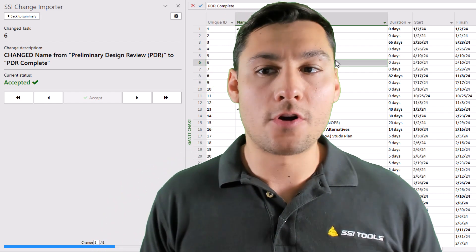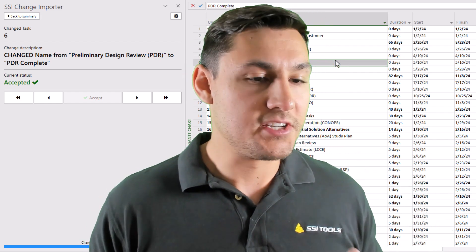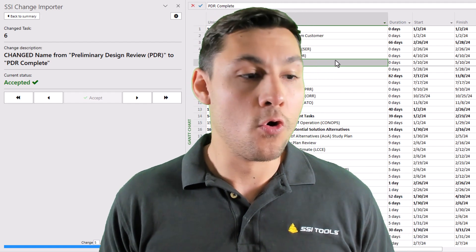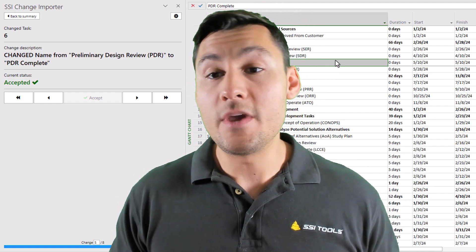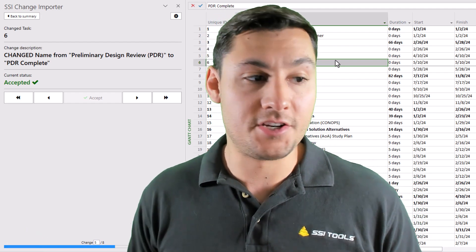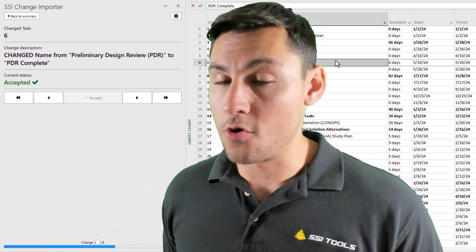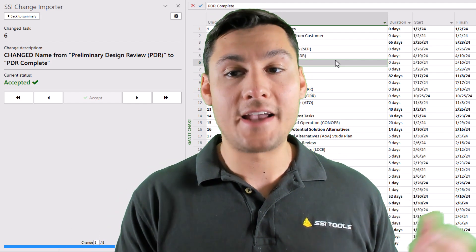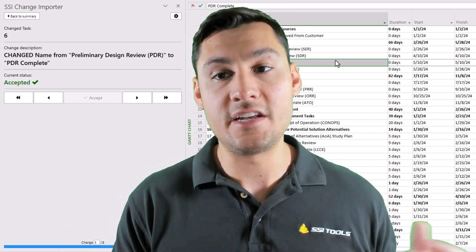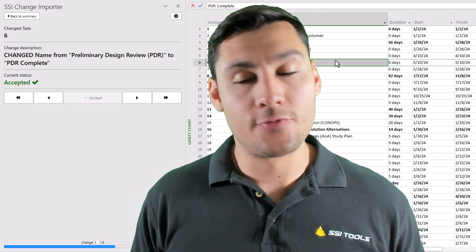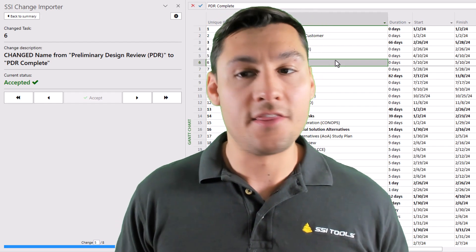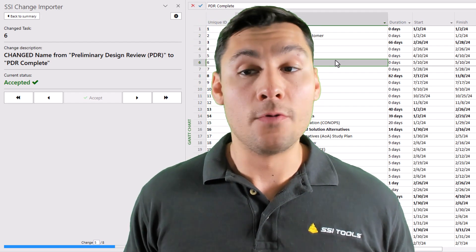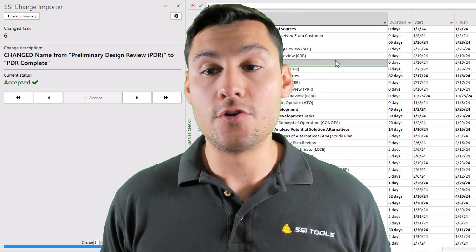Well, with the change recording tools, now instead of having that person just shadow a more senior level person, we can give them actual work to do in the project file, and they can just record changes in that project file, and those change tracking files can be sent to the more senior level scheduler, who can then walk through those changes with them, tell them what they did right, what they did wrong, and it will be a great learning experience for the new person.